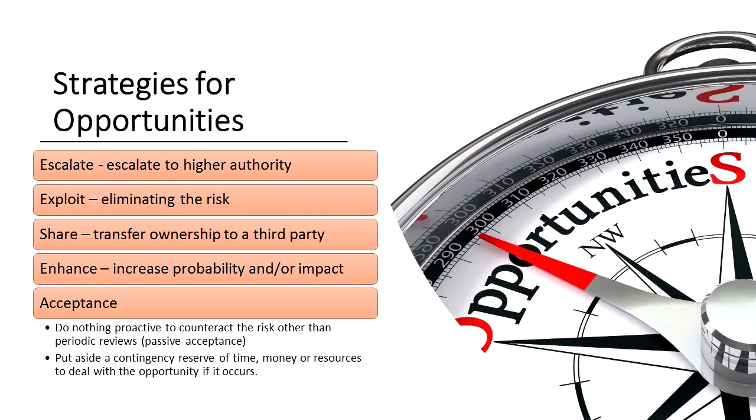The next one is called enhance. The enhance strategy is used to increase the probability and/or the impact of a particular upside risk. So while you're not doing everything under the sun to make it happen like you would in exploit, you're increasing the probability and/or the impact.